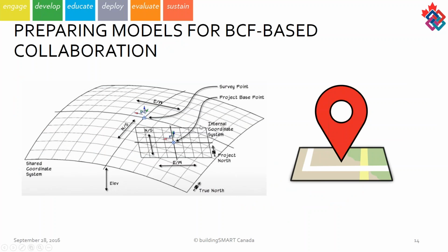So something to keep in mind when you want to use BCF on a project is to set up shared coordinates before you start the project. A good way, I think, that I do on my own projects is using a geodetic coordinate system for all my models, so that I can make sure that the camera coordinates that are exchanged in the BCF match for all the building information models used in the project. This can be documented in a BIM management plan or any other kind of best practice document that is created for the project.